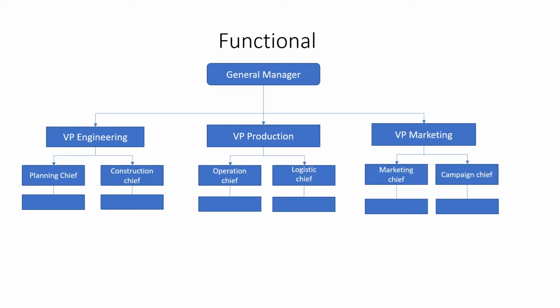Functional. This is the most traditional organizational structure in companies. In this highly centralized hierarchical structure, each member has one manager or coordinator, and people are grouped based on their functional skills or specialties. For instance, engineering, marketing, production, manufacturing, etc. So accountability is evident as the roles and responsibilities are clearly defined. However, each department is more concerned with its own goals. Therefore, there is probably less interest in the organization's overall objectives, and no person is responsible for an entire project.